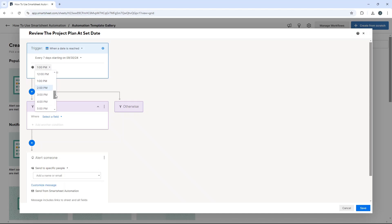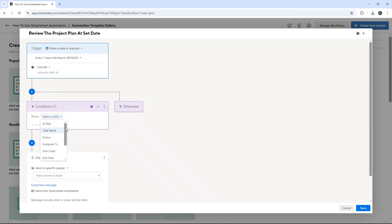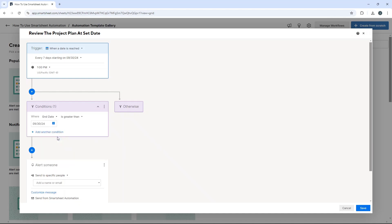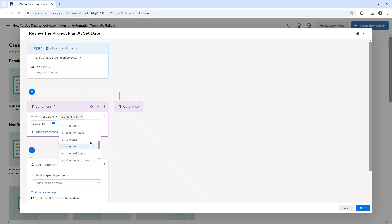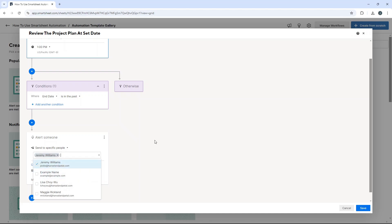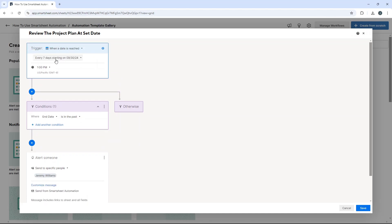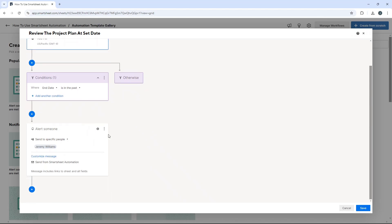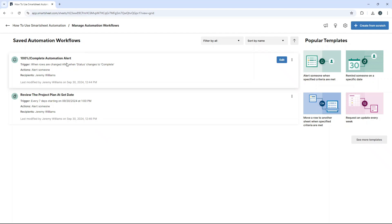You also set the time that they'll receive the alert — always a good idea to pick a time that works for the individual who needs to complete the task. For the condition, if the end date is in the past, alert someone. So when a date is reached and a task's end date is in the past, we get a notification every day for seven days. I'll put myself in as the recipient and hit save — we now have a second automation.